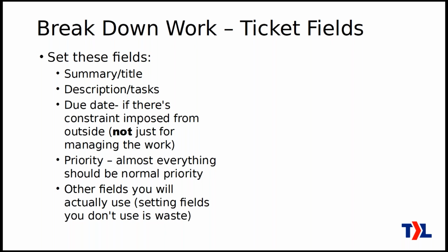Thinking about the priority, priority as far as your PSA is concerned is definitely more of a help desk sort of thing. For project work, you're going to use whatever you consider the normal priority for just about everything. You might use a lower priority for things that are nice to have, that you're going to do at the end of the project if there's any time left over, if that ever happens. Or maybe you might use a higher priority if there's unexpected stuff that has come to light later and it's quite urgent, then you can go ahead and use a higher priority. But when you're just doing the normal planning, you're not going to use the other priorities.